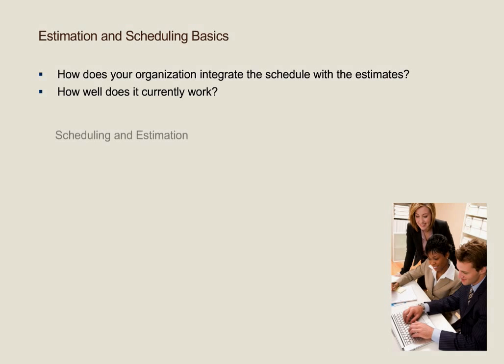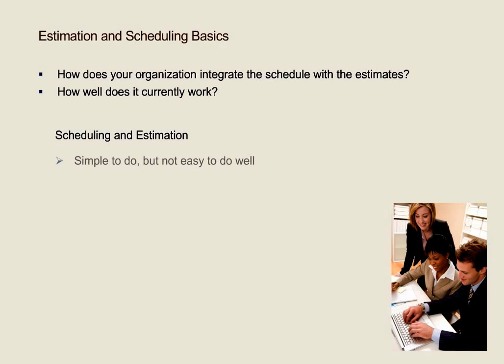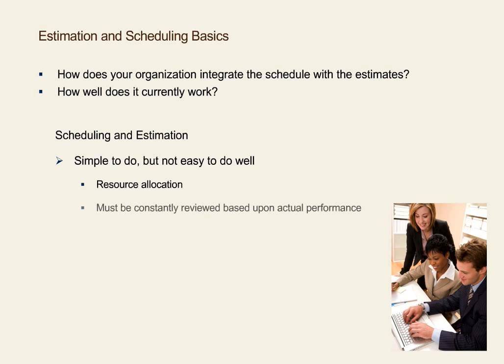We have highly skilled knowledge workers that have never been trained in estimation techniques, so their estimates tend to be flawed. If we are building schedules based upon flawed estimates, then the schedules are by definition flawed. If the project team does not trust the estimates and tries to schedule without reliable estimates, then the schedule is once again flawed, but for a different reason.